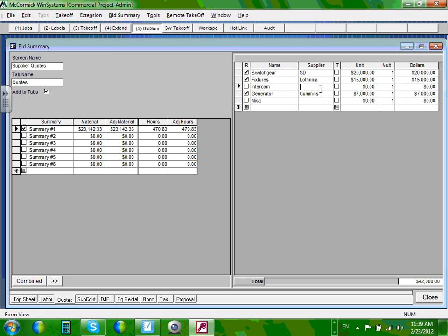And you hit the calculation and you submit your bid. That's what a quote is. Why would we quote? Because I hate the word shop around. You can get a better deal if you quote major equipment. Major equipment, thousands of dollars. We're not talking about a switch on the wall at 33 cents here, or a $1. We're talking about anything that's $1,000 or more, or $500 or more. We start quoting these equipments.